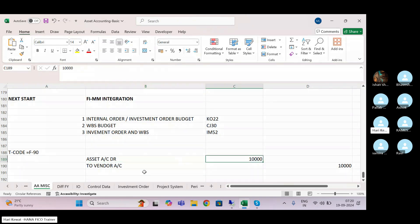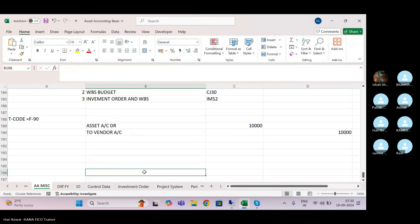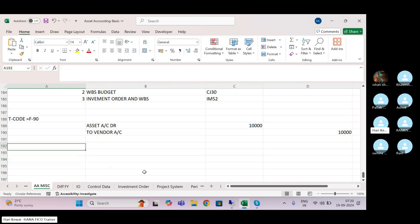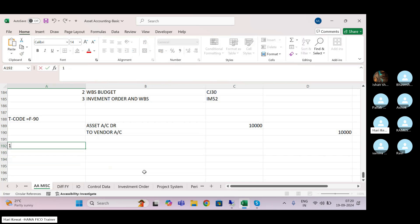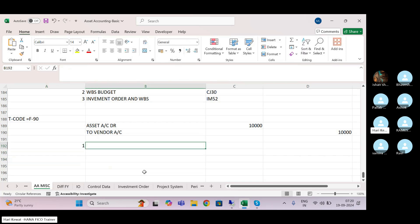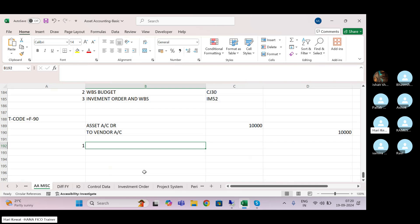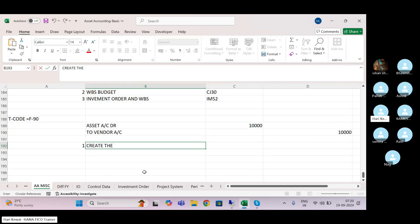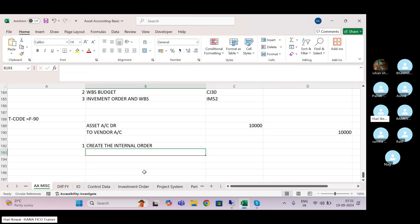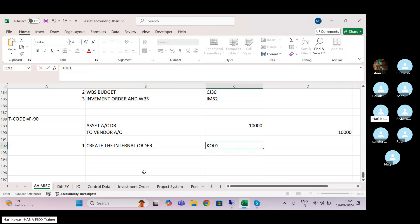To control this, you have to follow certain steps. Step number one: create either one internal order, one WBS, or one investment order. For example, create the internal order — go and create one internal order in KO01.